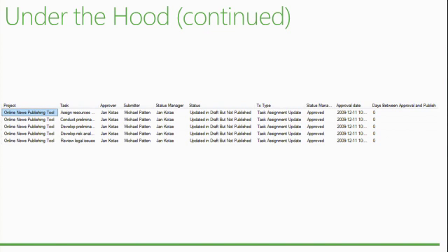But what we found out in most cases is that the users, whatever their role is, are not following the process, because they don't understand how that works. So they think that because they input things into the timesheet or the task update and they close the page, the information flows. It's not what's happening. And I can tell you in 99% of the cases, with all the customers I've worked with, users at different levels complain about the timesheet, the task update. I inputted my data in there. It never came out, right? I did what I was supposed to do.